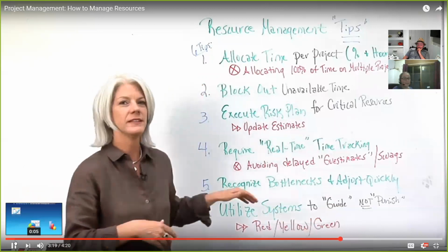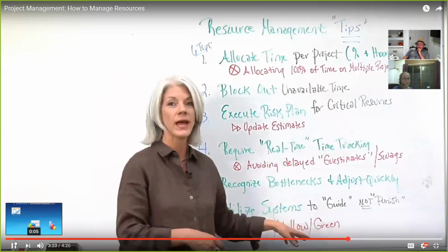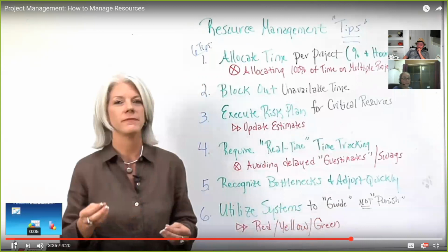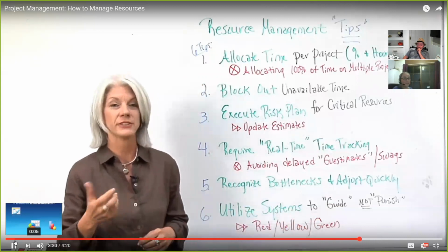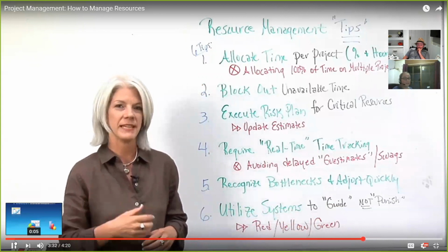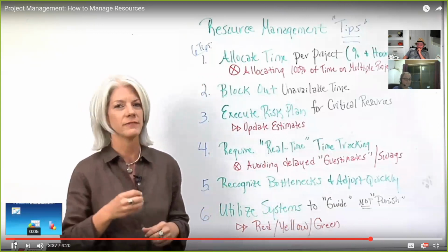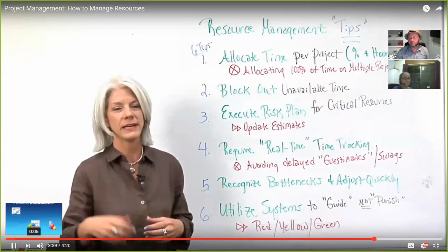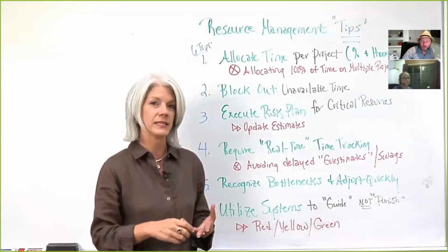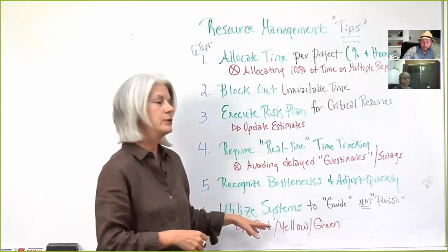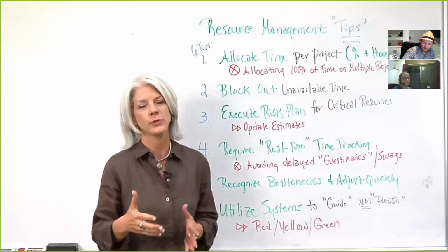If these systems are used to punish resources whose items are in red, they may not indicate their status correctly. They may indicate everything's green or okay, so they won't get in trouble. Instead, if they're used properly, to help manage the project, address any issues or risk or escalate in a timely manner, then the team will have the trust to report things accurately.